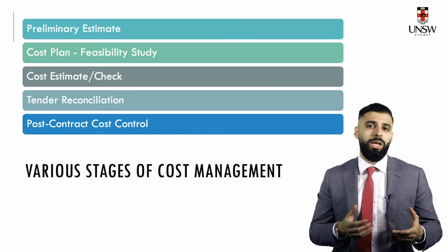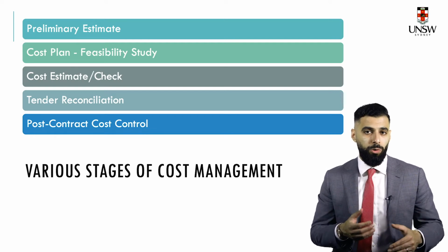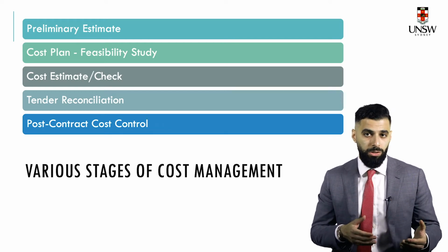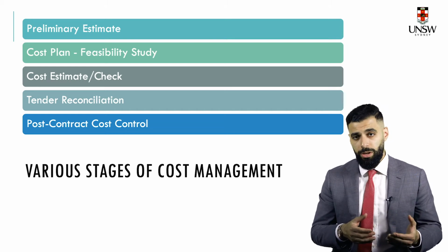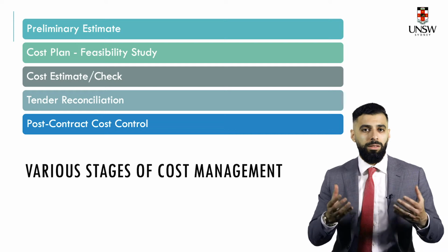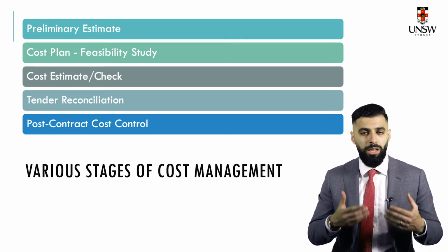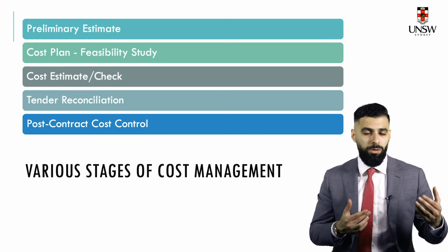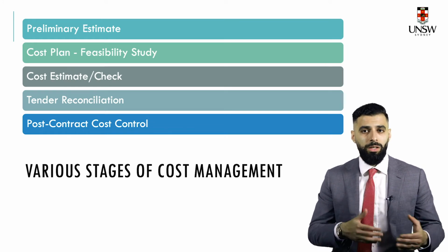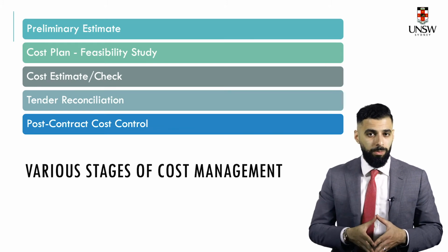It is important to note that a cost plan in the construction industry is used as a way of controlling the estimated costs during the design and construction phases of a project. So this means that cost plans are living artifacts. Just like the project plans and drawings need to be constantly updated, you have to make sure that these plans are updated as you move across the life cycle of the project.